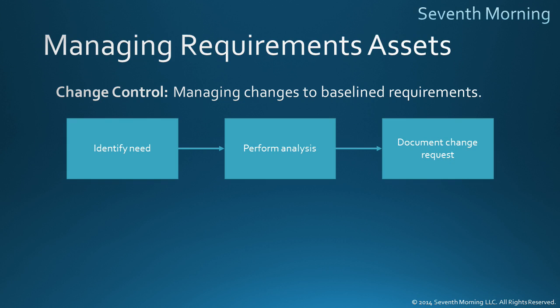The next step is to document the change request. Sometimes there's a form associated with this, but sometimes a full requirements document is required. Each organization does this differently. And sometimes it differs based on the size of the change. Whatever the case, some written record of the change request is created, and that document lists out the new requirements or the changes to the existing requirements that comprise the request. This is one area where giving your requirements unique identifiers, like FR1, FR2, that kind of thing, proves really helpful, by the way.